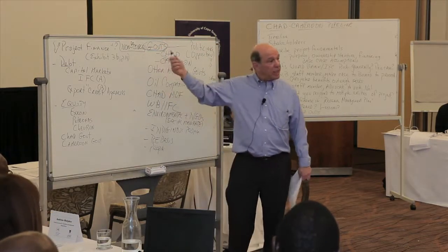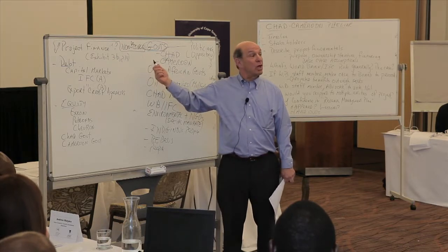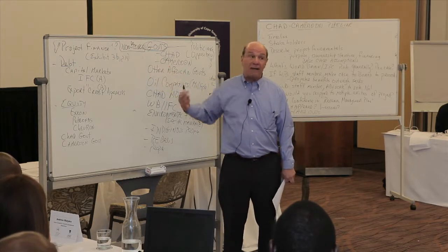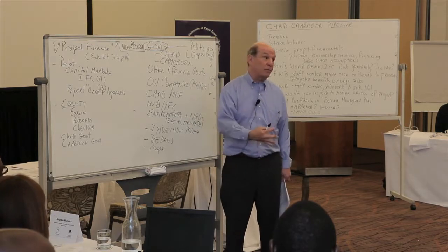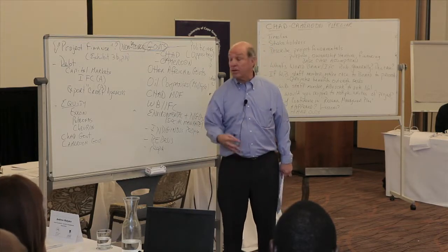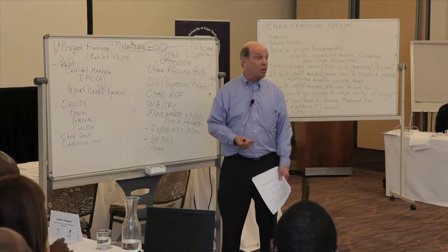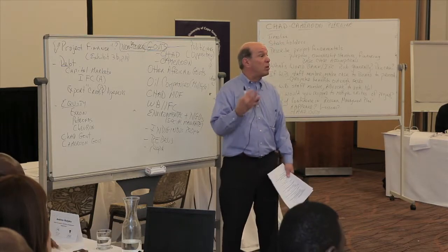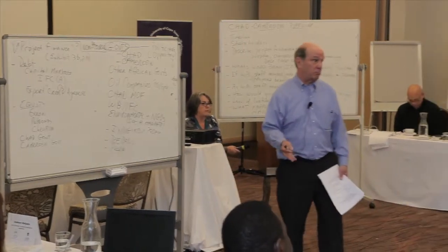When the IFC lends to a private enterprise, it has no recourse, including to the government of that country. So if IFC makes an investment in a company, it's a non-recourse loan or a non-recourse investment, and if it fails, they can't turn to the government and say, pay up, make good on the promise. They are at risk like any other private investor with that private enterprise.